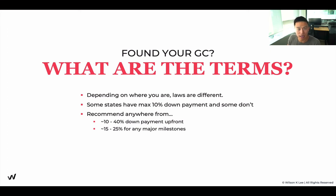The second type of payment should be tied to major milestones, such as receiving your city permits and licenses. Always retain at least 15% of the total payment until after full completion. When they finish renovating, you may see marks on walls, unfinished paint, or screws everywhere — by holding that 15%, they still have incentive to come back and complete everything properly. If you've already paid in full, they have no reason to return and finish the details.